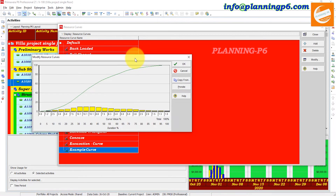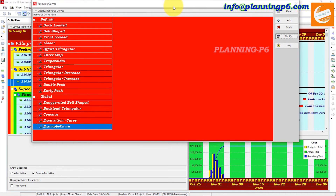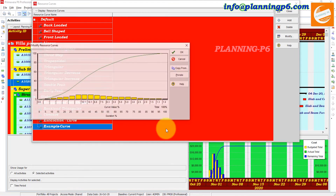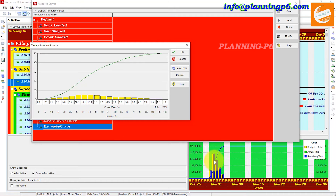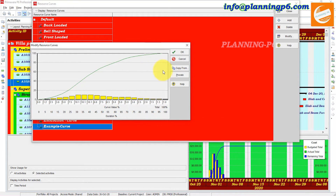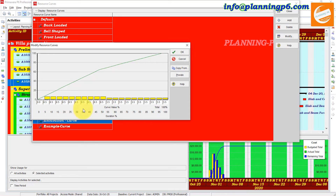If we go and see the curve — modify it — you can see first it is very low, then it increases to that level, keeps increasing as assigned, and then it comparatively comes back down. That wave shape is how we can create or modify curves using the Primavera P6 resource curve feature.